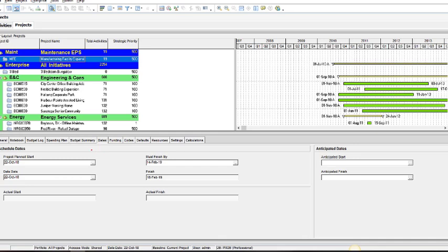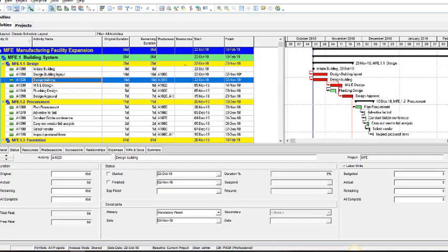Changing some of these durations is of course going to affect certain things in your P6. It may also affect some of the project activities on the critical path, and may even result in what we refer to as negative float. So if I navigate back to my activities page, let me add my float column so that you can see what we're talking about.